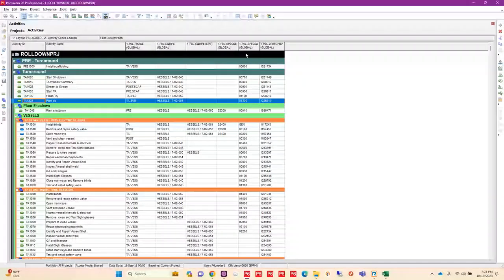I also have some specs here, and these specs are, again, duplicated. They're both at the global level. They both have information in them. That information is assigned in my project, but I want to combine those, and I want to keep what's assigned as those values there. But this doesn't need to be a piece of global information. This actually is only pertinent to my project, so I want to make this a project level activity code. And the same goes for my work order. My work order code right now is a global code, and I want to push that down to a project level.